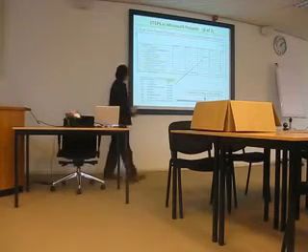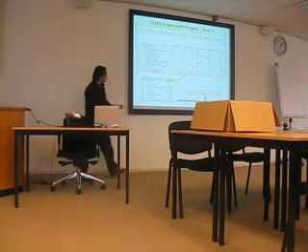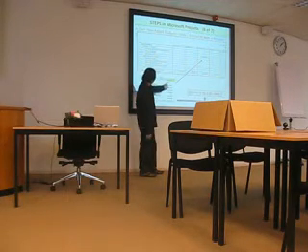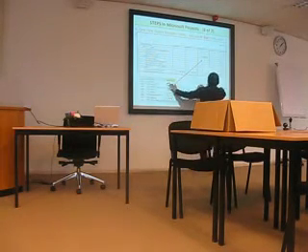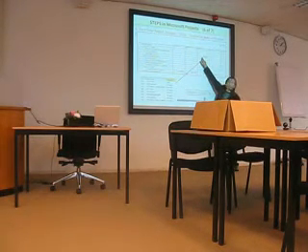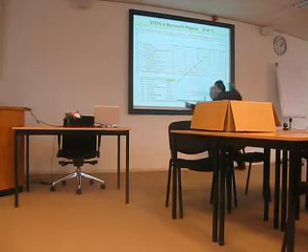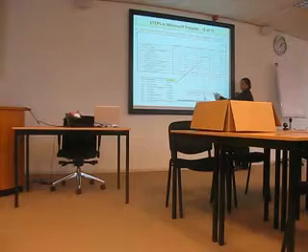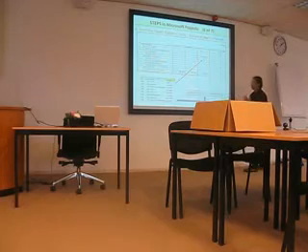Okay, this is the cash flow. The cash flow report, but the cash flow of the budget. This is an important thing: how we accrue the cost. We can choose start point, finish point, or prorated. It is the example of start. If you include the expenses or the cost at the start point, it means 3,000, no matter how long the duration of the activity. If you use prorated, 10,000 divided by the duration of the task, 10 days, and then per day would be 200 euro. It's prorated. Prorated, same number, same expense.